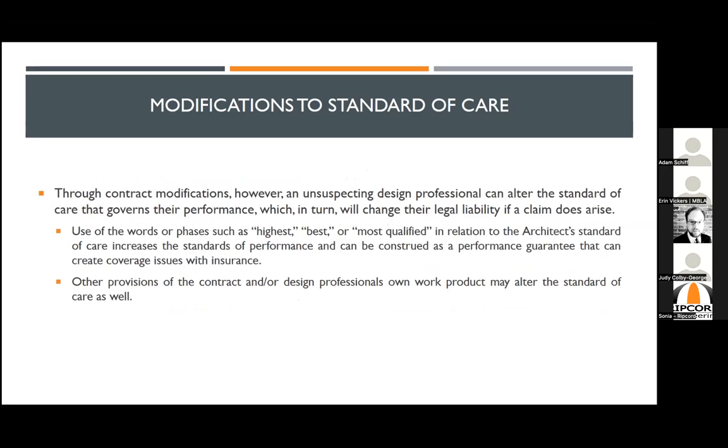But through contract modification or other language elsewhere in the contract, you can be altering that standard of care and unknowingly essentially turning a good contract into a bad one fairly quickly. And so if you haven't, you might see, if you're doing government work or work for a sophisticated client like a college or a school department or a hospital, they can sneak in words in the standard of care about highest, best, most qualified. And those are easy to spot. And if you do see them, I would push back on them.